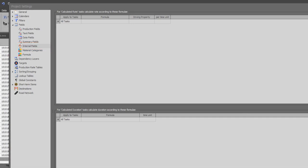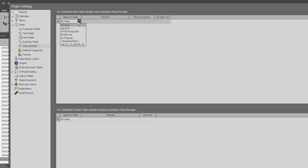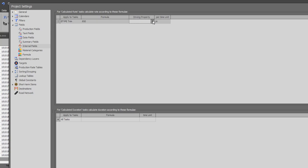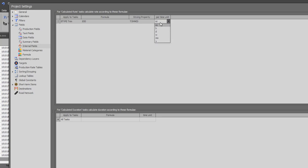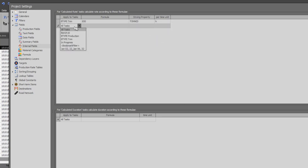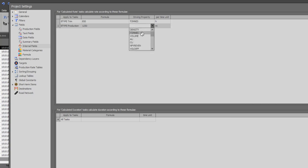For example, I can define the rate of the calculated rate tasks as follows. I need to provide a filter, the formula, and the time unit. The filter is trim blocks, the rate is 850 and the driving property is tons while the unit is hour. For the production blocks, I will put 1250 tons per hour.